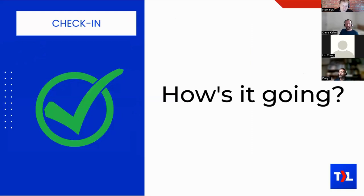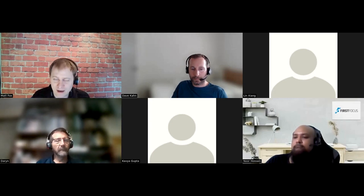I want to check in and see how things are going. The homework was to use top left for backlog estimation, dispatch, and resource planning in your projects. When you make new tickets for projects, make sure you're using good scope practices — you don't want tickets that are too small or too huge — and think about where the bottleneck is in your engineering workflows. Did anybody need to go through and scope out tickets for any projects over the last week?